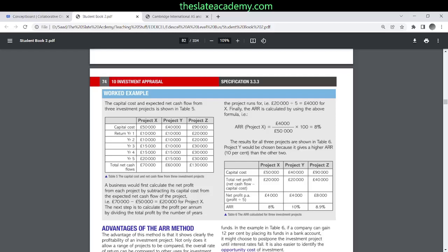The net profit per annum is you take the total cash flows for the project, positive, negative, everything. If you add them all up, cumulative cash flows, they give you the total return for the project, the net return for the project. But that net return is over the life of the project. The project may have a 5 year life, 6 years, 10 years, 20 years. So if you add all the cash flows, they give you the net return of the project over its life. Then you divide that net return by the life of the project, you get the yearly return.